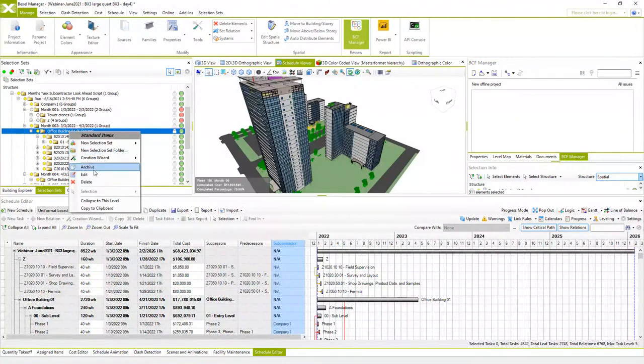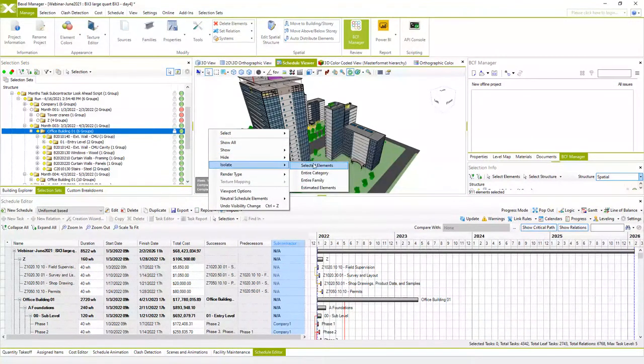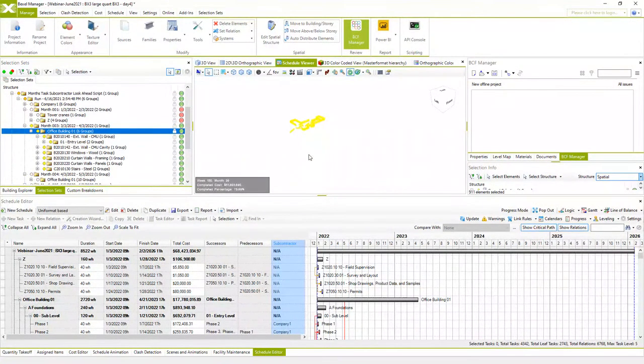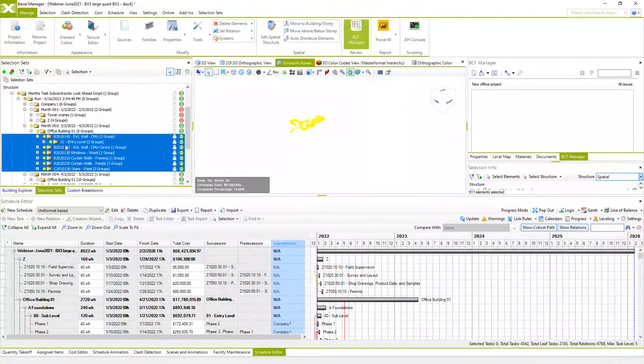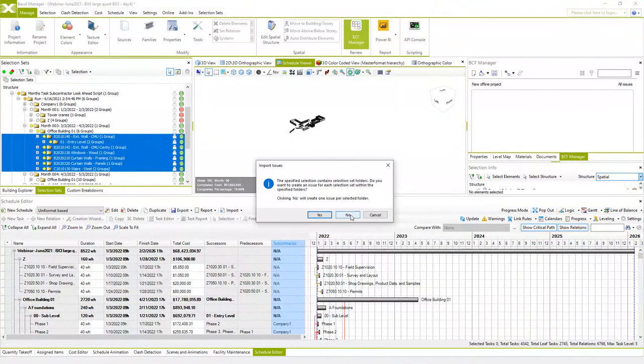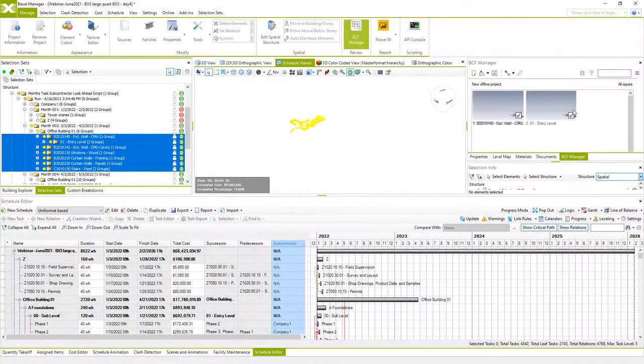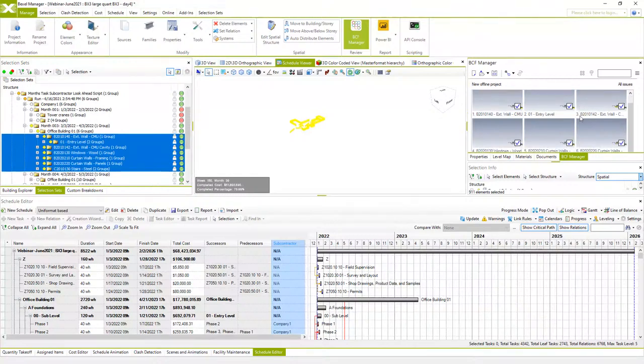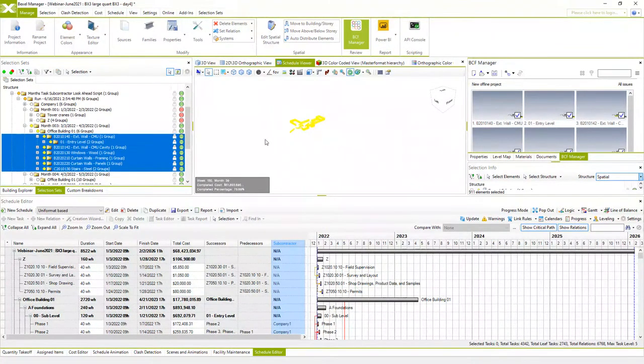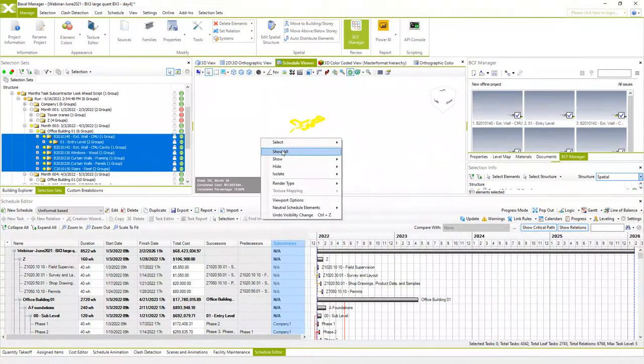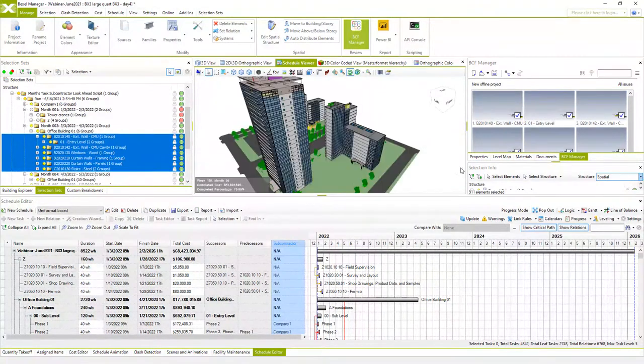You see that we have a folder which contains all works for company 1. Now we can quickly isolate only selected work groups from a certain subcontractor in a certain period, and from this you may create BCF files and send them to on-site teams so they can input progress for respective works. You can create BCF issues for each folder or for subfolders of selection sets.